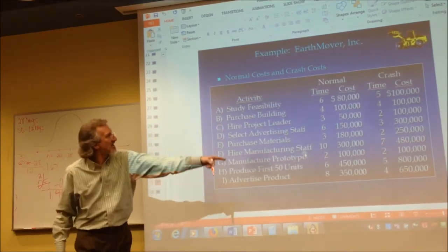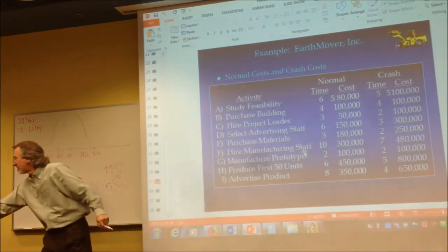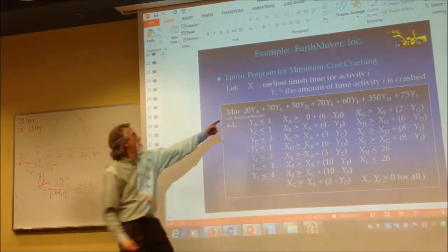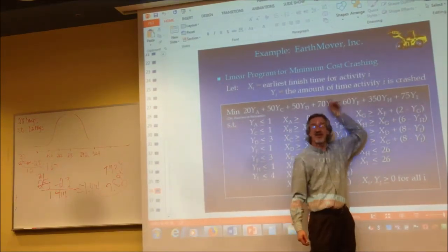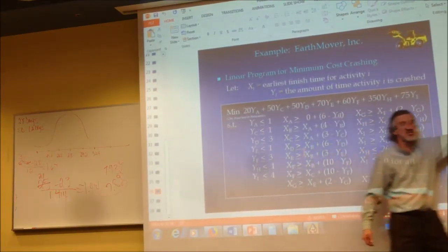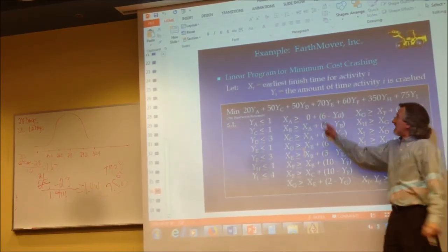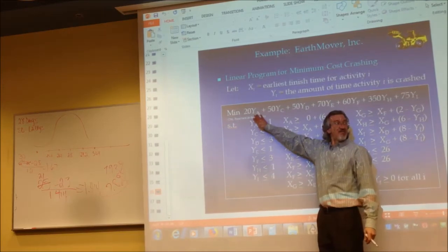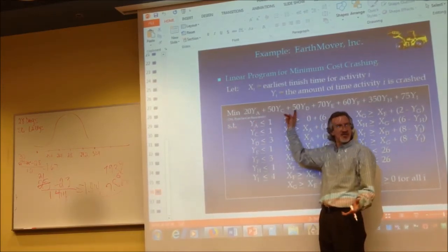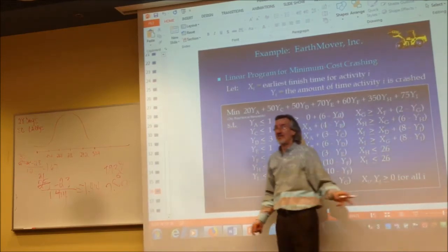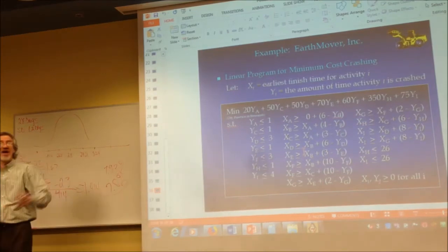Those numbers in the last column, 20, 0, 50, 50, and that bottom one, 75. B's not in there because it's 0. So 20, 50, 50, 75 is your objective function. So that's what this is all about, to find that cost per 1 unit. And it's always multiplied by the y variable with the little activity. What is the activity? This is activity A, activity C, activity I. It's the y variable in your objective function. So that's how you come up with that.